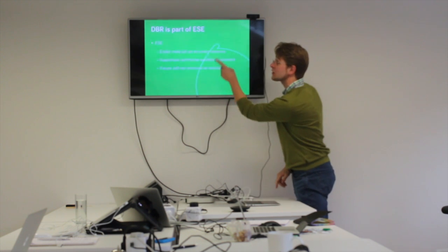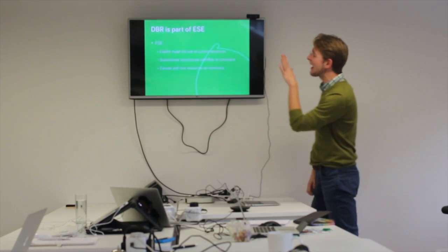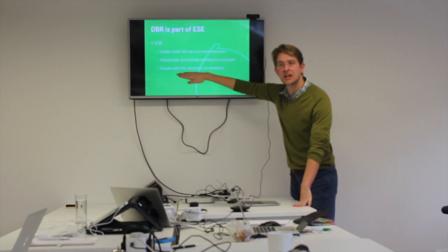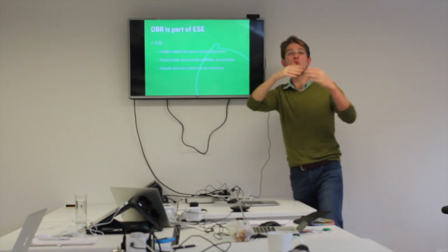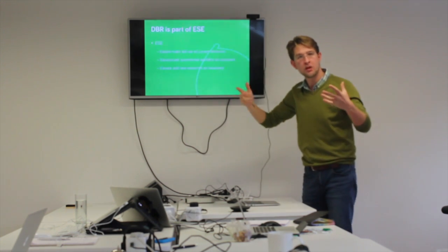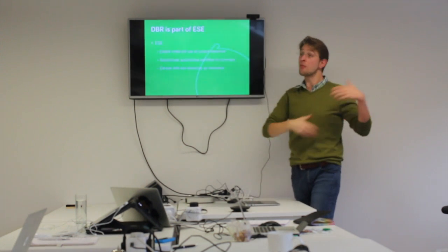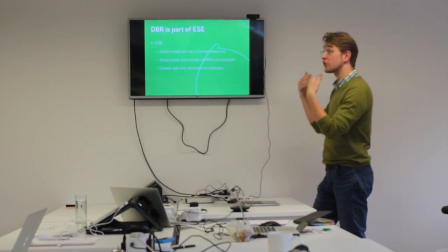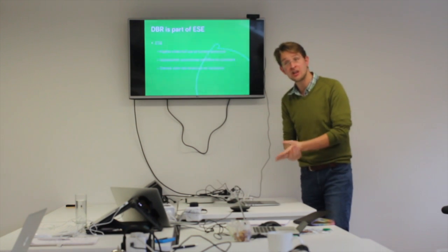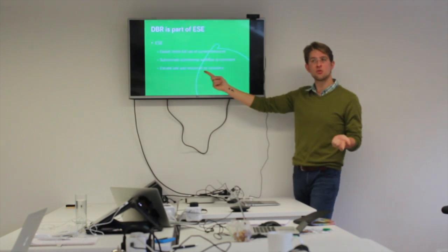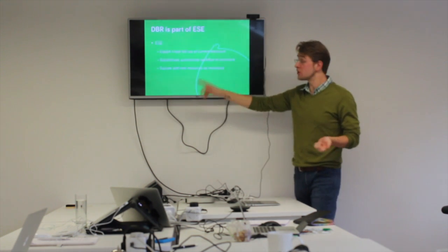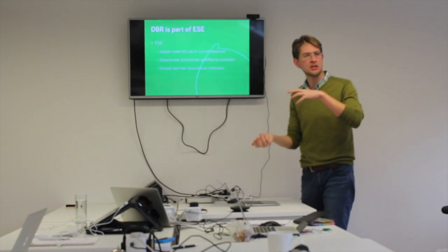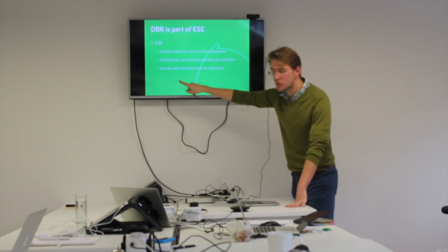With this exploit, subordinate, elevate strategy, generally speaking, what people do is they go straight to elevate. You say, we have a problem with the throughput of our workflow. We have a problem with the rate at which stuff is being sent to clients. We're not able to service the demand of the market. So our solution is to add new resources, right? Which might mean hiring new people, or it might mean training existing people to handle other parts of it. But this is where people jump.